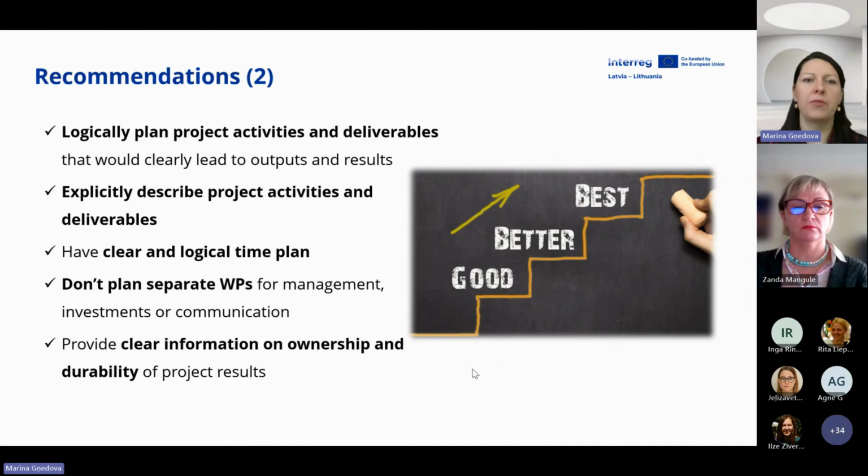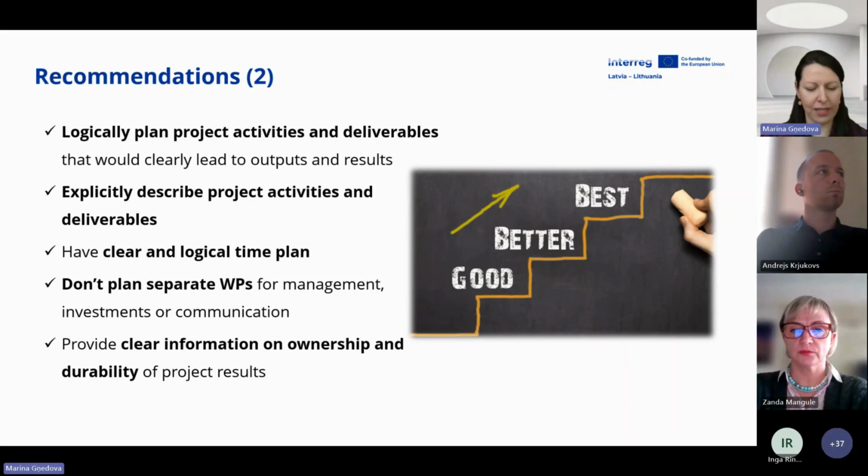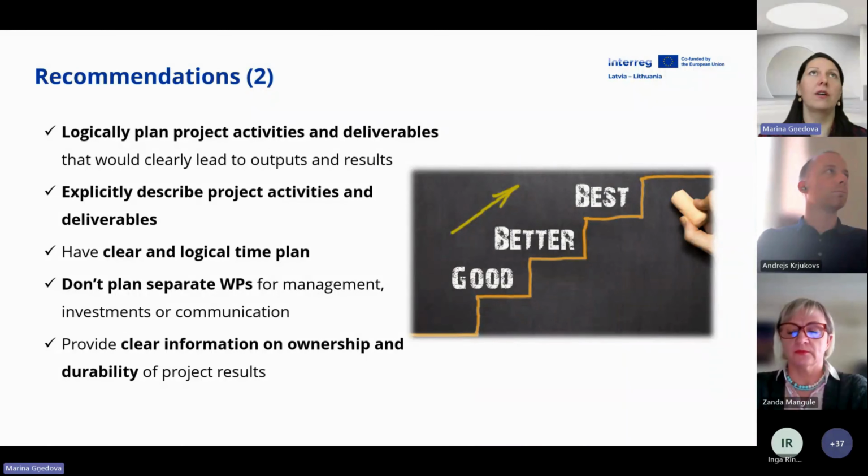Of course, logically plan project activities and deliverables. By the logic, I mean logical sequence. If, for example, methodology needs to be developed, then at first, the logical way seems to be that some working meetings are held, some on-spot visits, some preparatory works are done, then the methodology, then promotion.